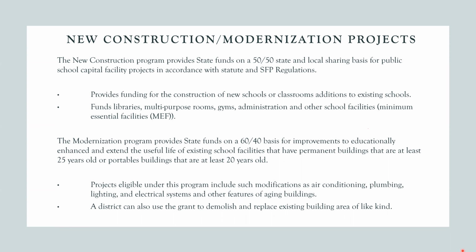Now, the modernization program is only for improvements to educationally enhance and extend the useful life of existing school facilities that have permanent buildings that are at least 25 years old, or portable buildings that are at least 20 years old.